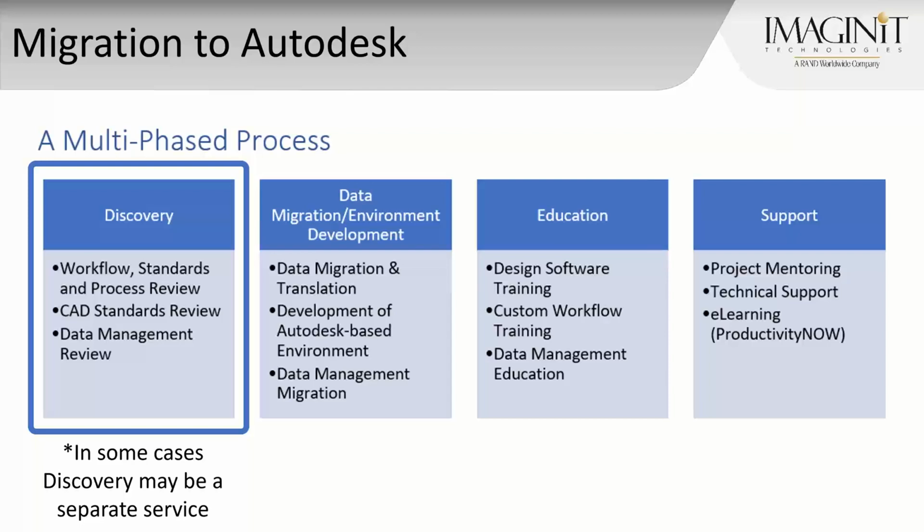So in many cases, we actually do the discovery phase first as a separate component of the entire process. So it will be an actual standalone job service that we do. The reason this happens in large migrations, we really need to understand the magnitude of the translation of the files, the old CAD standards, and if there's any data management involved, because in order to write a comprehensive statement of work, we need that understanding. And so we will do the discovery phase first. There's a separate engagement, and then create that roadmap, and then write the statement of work to take the translation through the end.